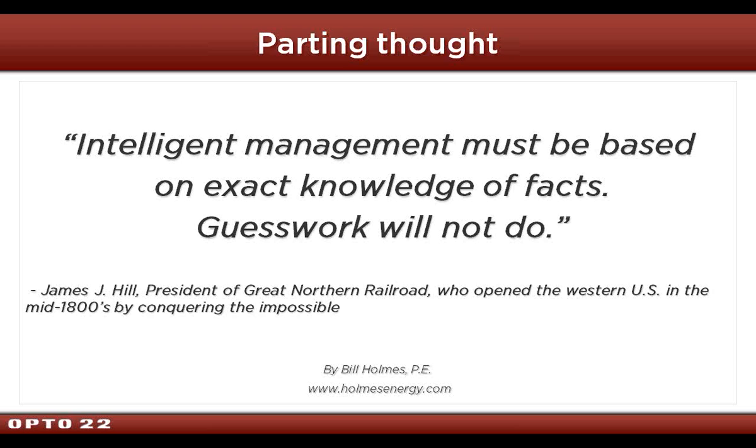Once they bought it, we trained them, it was theirs. And normally we would sub out the installation to an electrical contractor who was already in their facility. In some cases they had their own electricians, but in most cases an electrical contractor, and we just had to coordinate. Sometimes we worked over Christmas shutdowns to install things when the power was off. But yeah, Bill, you hit two of them there.